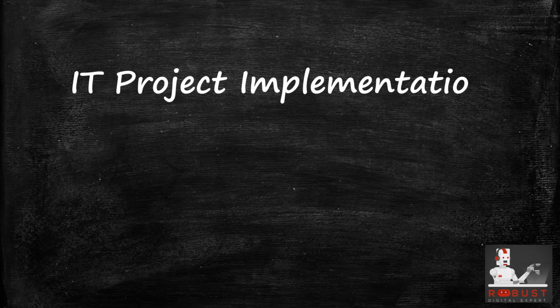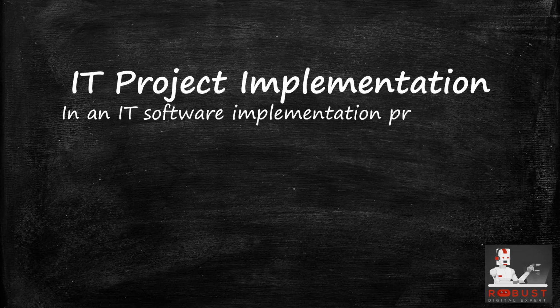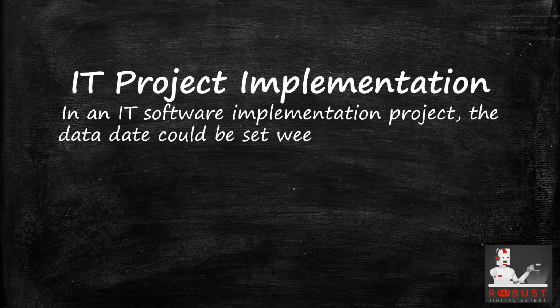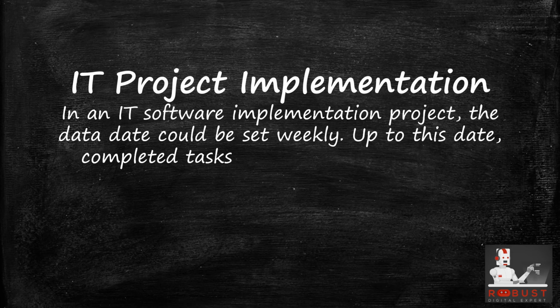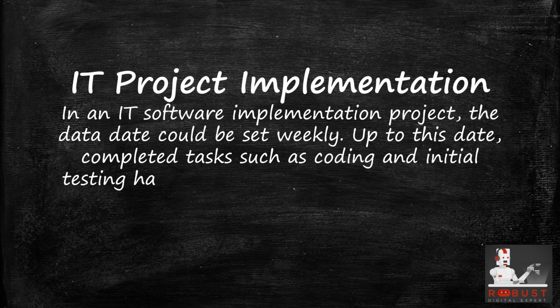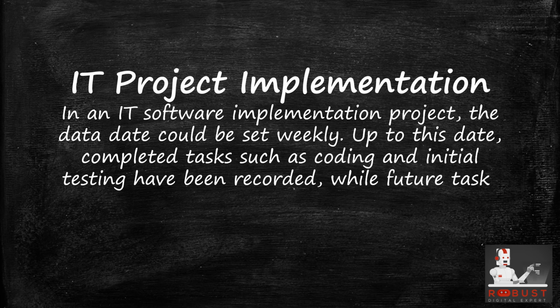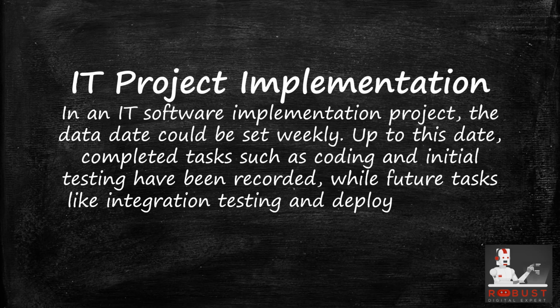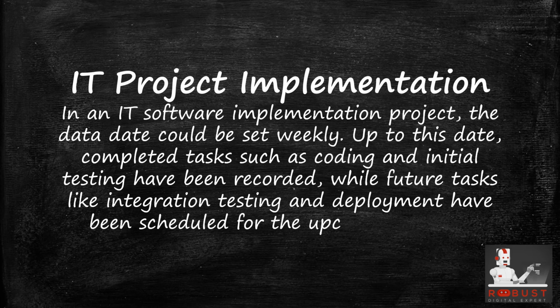IT project implementation. In an IT software implementation project, the data date could be set weekly. Up to this date, completed tasks such as coding and initial testing have been recorded, while future tasks like integration testing and deployment have been scheduled for the upcoming period.